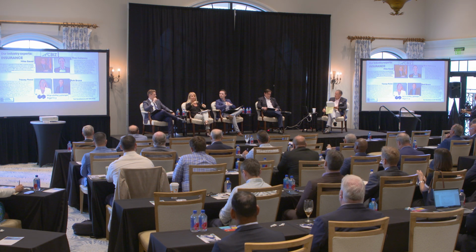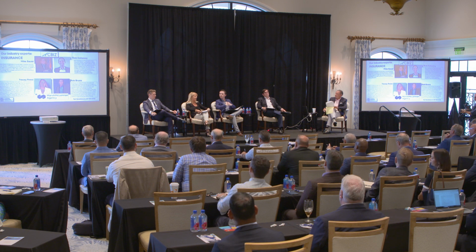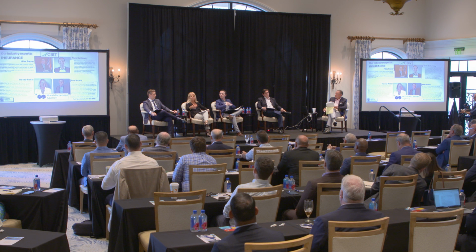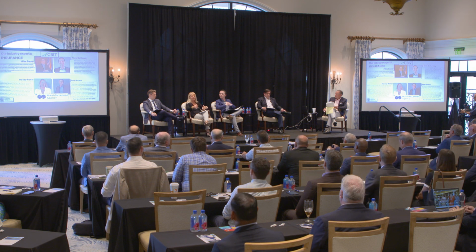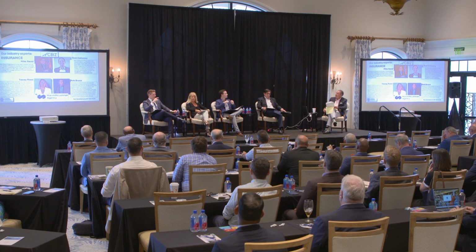So those are the type of things we always are concerned with: wind, roofs, and sprinklers, and impact glass, and all that. But I think you definitely now keep that in mind when you are starting a capital improvement. Obviously, you only have a certain amount of land. You can't place it too far away. But keep that in mind to have that discussion with your broker, because that is something the carriers are literally now measuring. Is there a street in between? Is there an area in between that the fire cannot jump before they're willing to say, we'll take that additional exposure?